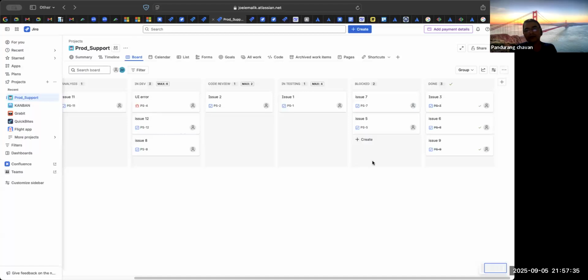Now the toxic management will say make them work more. Even after working more, your capacity is 5, maybe 6. Still 2 will be pending. You can push people for a brief period of time, but if you push too much, then they will compromise on unit testing. They will compromise on the code quality.